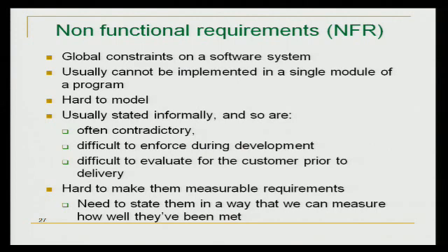Now, I will tell you a couple techniques that have worked for me. But performance, for example, is hard to deliver incrementally. You can do some of it by optimizing, putting an optimization plan together, but usability is hard to evaluate prior to the customer seeing it. So one thing we can do to address usability as a requirement is get prototypes out to the customer for them to analyze.